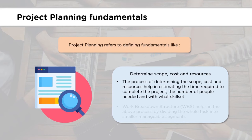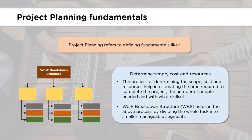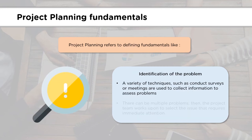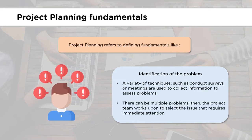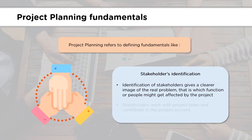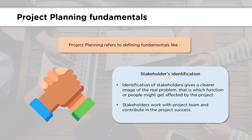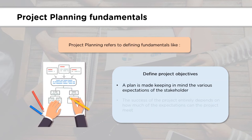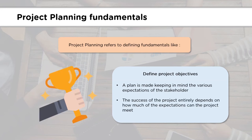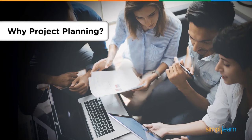The project planning fundamentals are: first, determination of scope, cost, and resources — this provides a rough estimate of time required, the number of people needed and their skill sets, and enables dividing the project into smaller manageable sections using WBS. Second, identifying the problem — collecting information to discover issues, prioritizing risks, and addressing the most critical first. Third, identification of stakeholders — understanding who will be affected and how. Fourth, defining project objectives — ensuring the project team can meet stakeholder expectations.